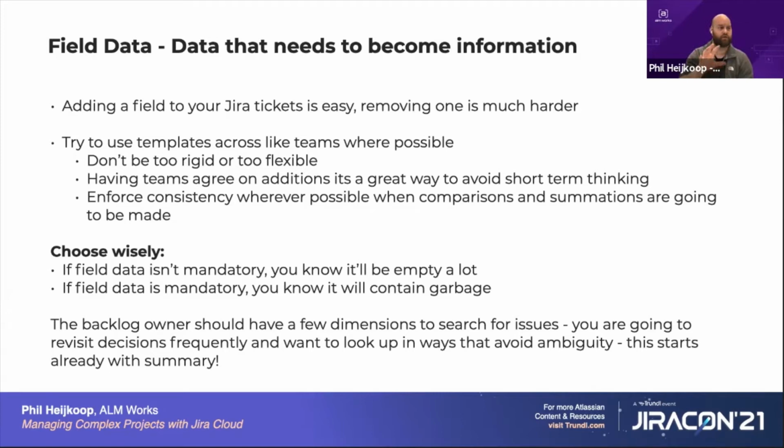And there is this first choose-wisely moment where the field data can be made mandatory. If it isn't, it's going to be empty a lot. The developers usually take the path of least resistance. So as long as there's no error when they fill in a form, they'll happily leave it blank. The flip side of that is that if it is mandatory, they have to fill it in.